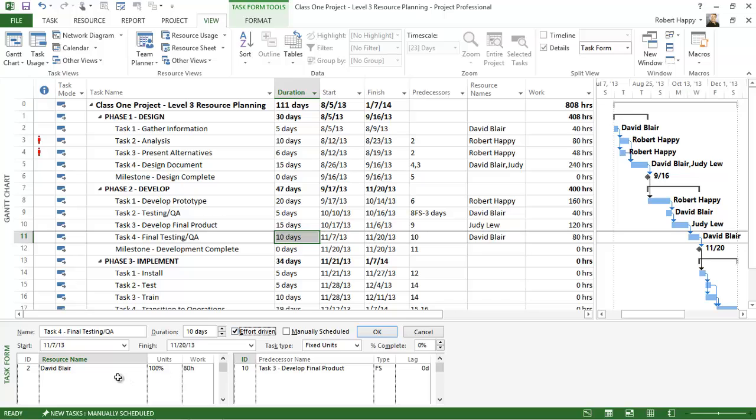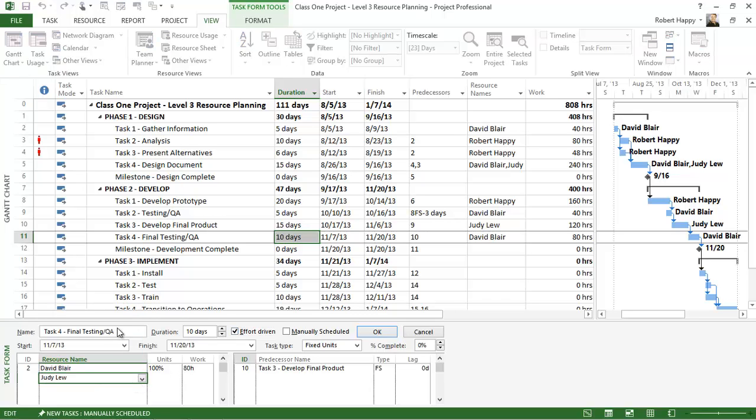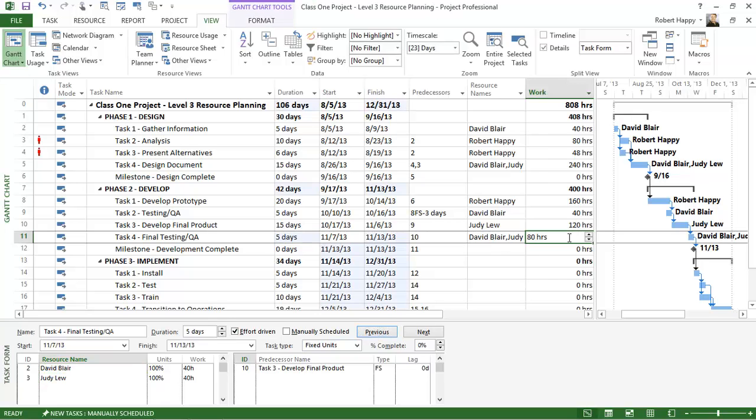So same type of thing happens if I come down here and I type in another resource and click OK. Notice my duration gets cut in half but my effort stays fixed.